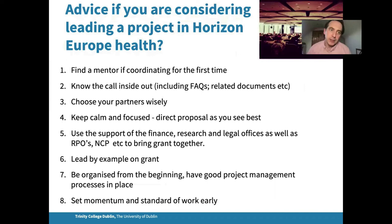So, advice if you're considering leading a project in Horizon Europe: find a mentor if it's your first time. It will save a lot of pain in terms of understanding the processes. Know the call inside out, including the frequently asked questions and any related documents that are on the website. Choose your partners wisely. Big red flag for me is if they're not contributing to the proposal and you drag them through, the chances are you might struggle with them if you're awarded.